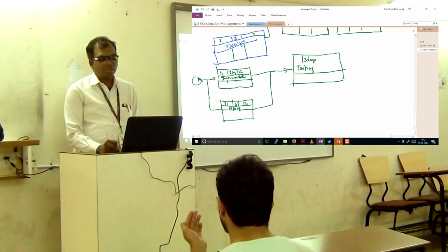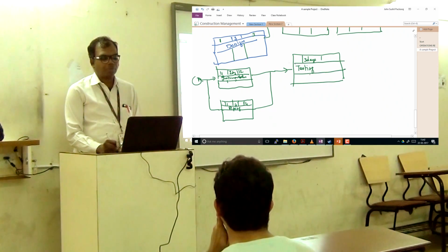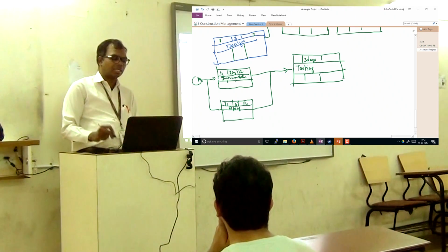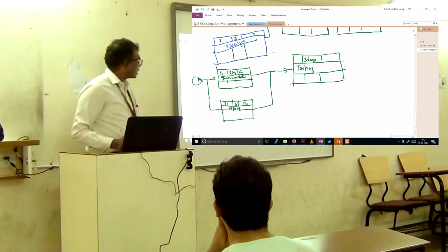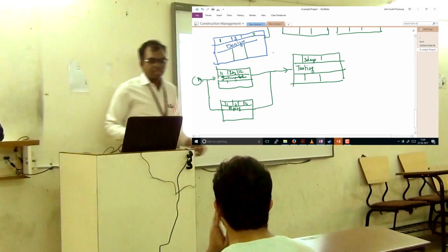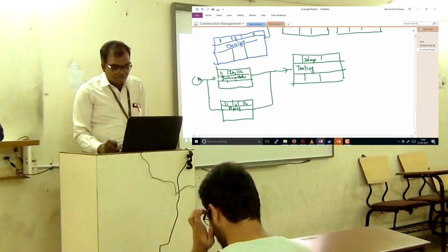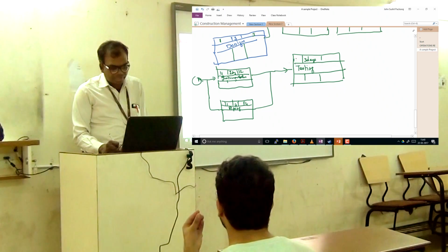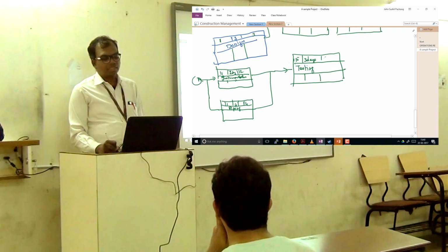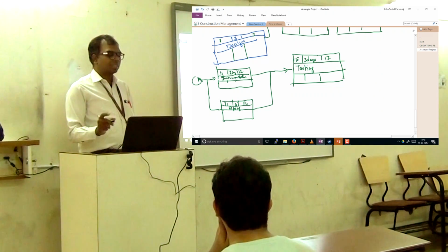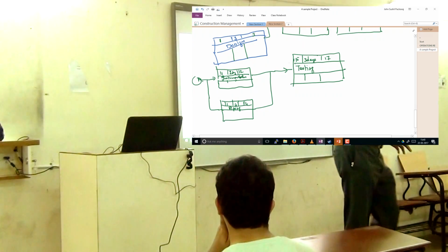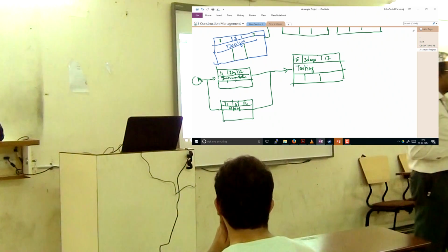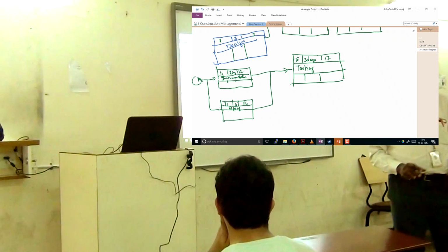By the way, what is the early start for testing? 15. Because I can go only for the next calendar day: 15, 16, 17. So if I'm not envisaging any delay, the project is going to get over on the 17th day.